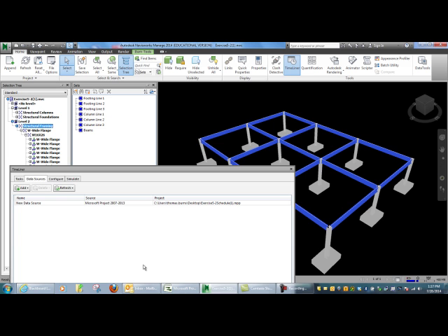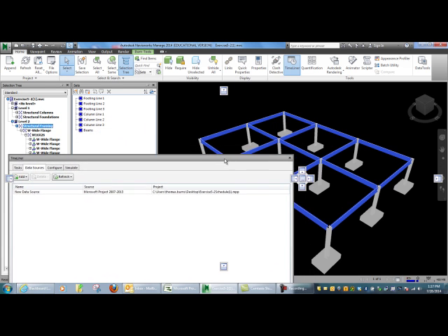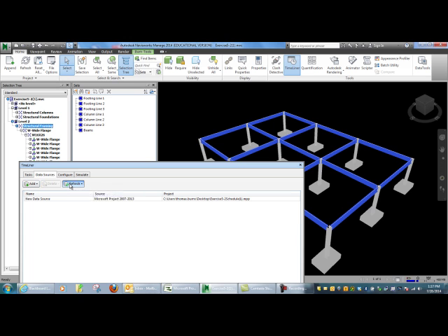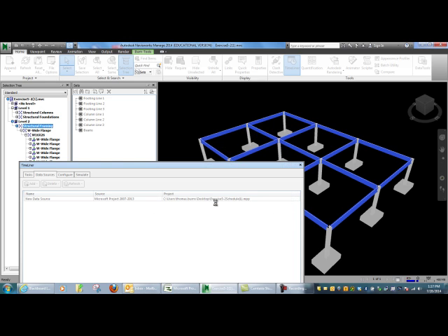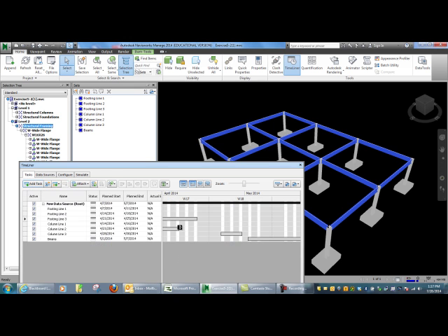All right. And once I have this, what I can do is just say refresh. All data sources will allow this to stay on rebuild task hierarchy. Okay, and that's sort of linked the schedule to the actual Navisworks file. If I go back to task now, you notice I've now linked together the schedule with all the tasks. Okay, and that they are actually given durations that are reflective of the durations in the schedule.